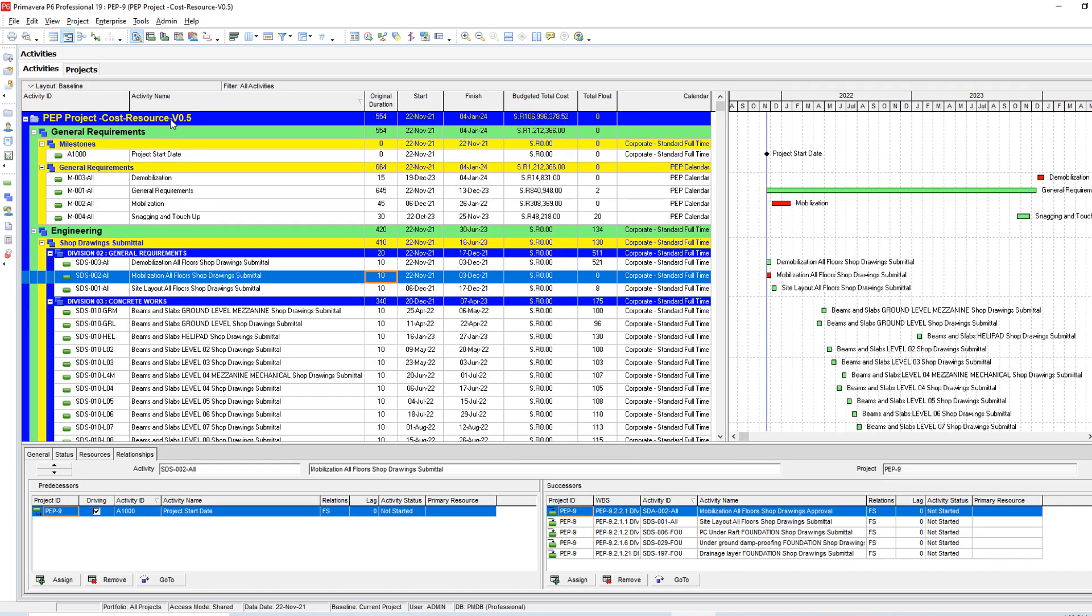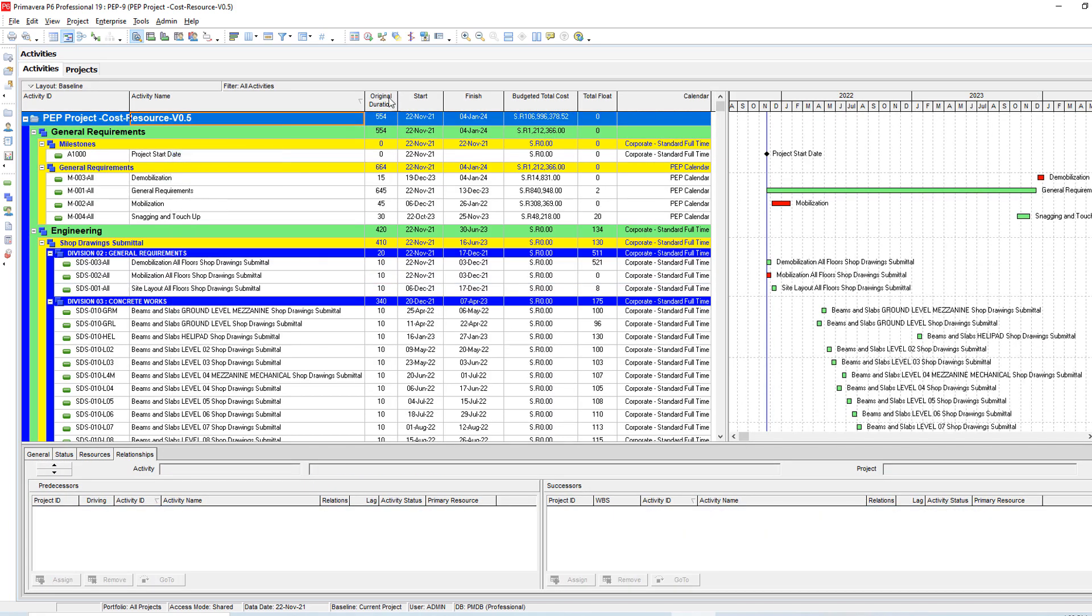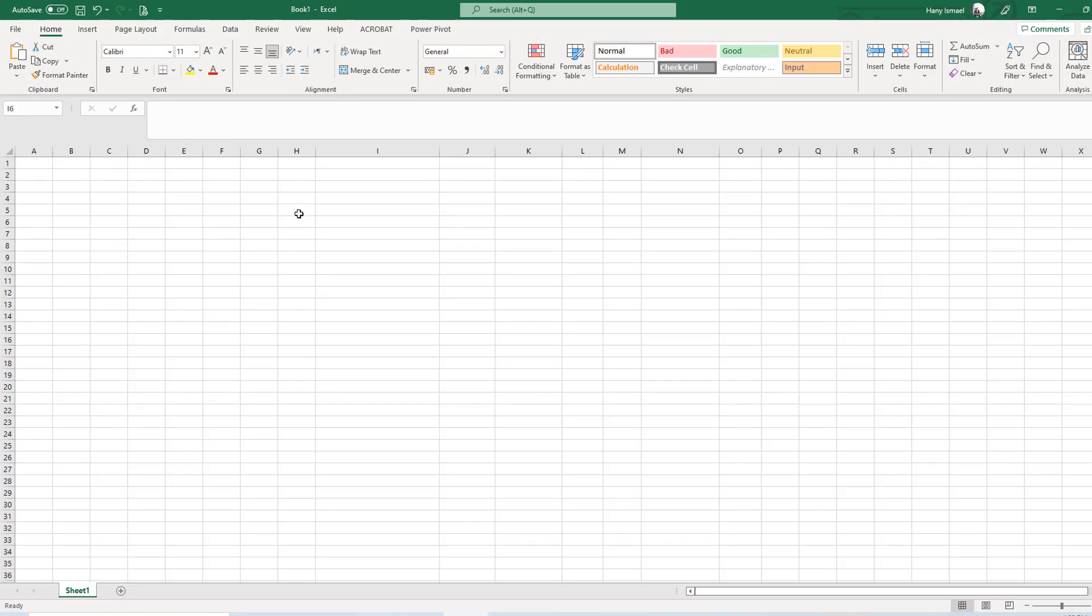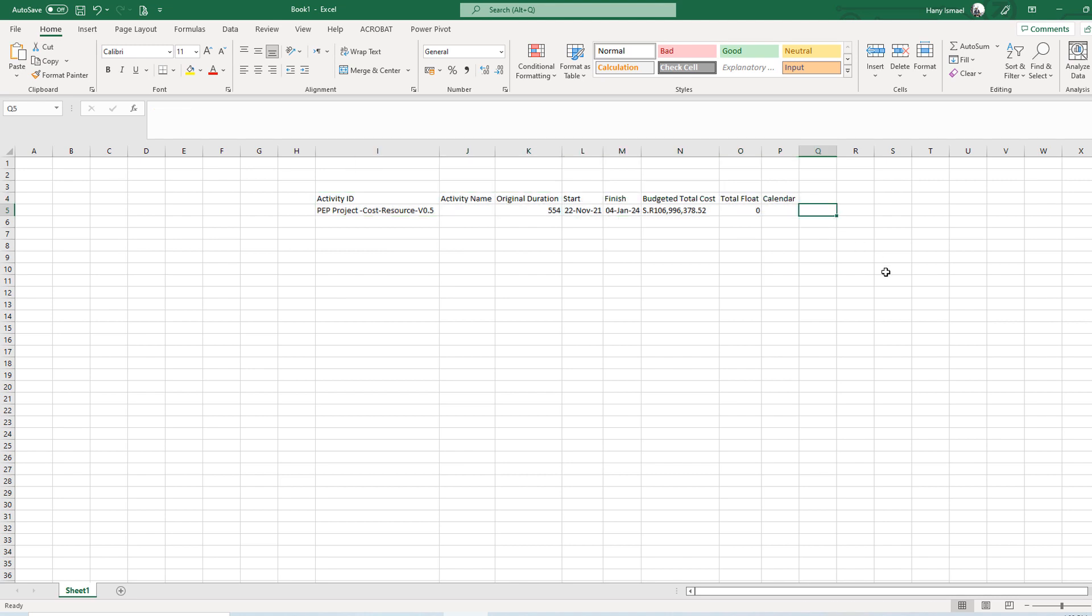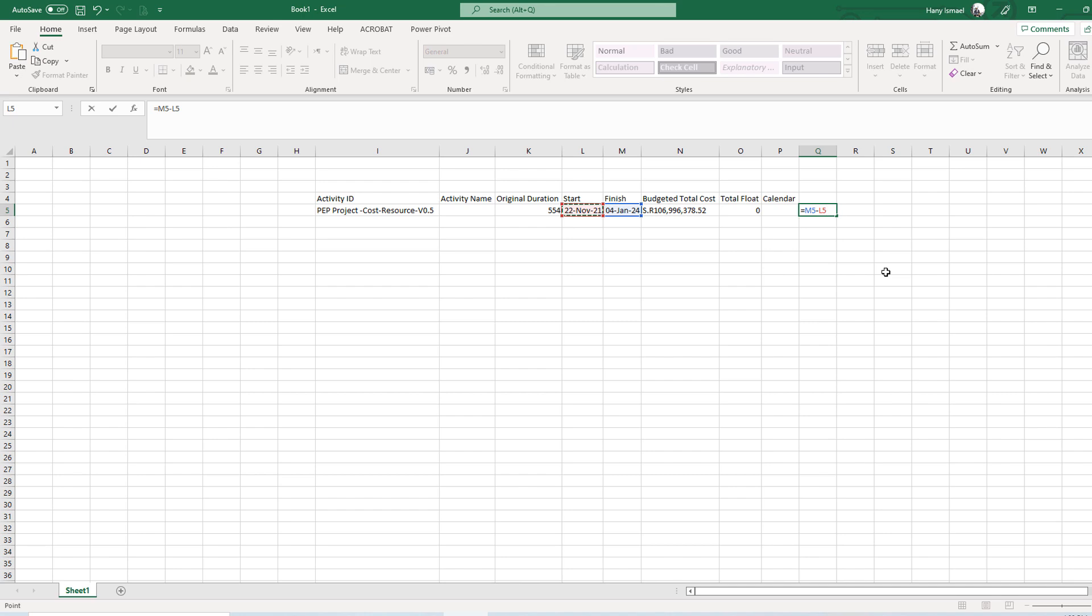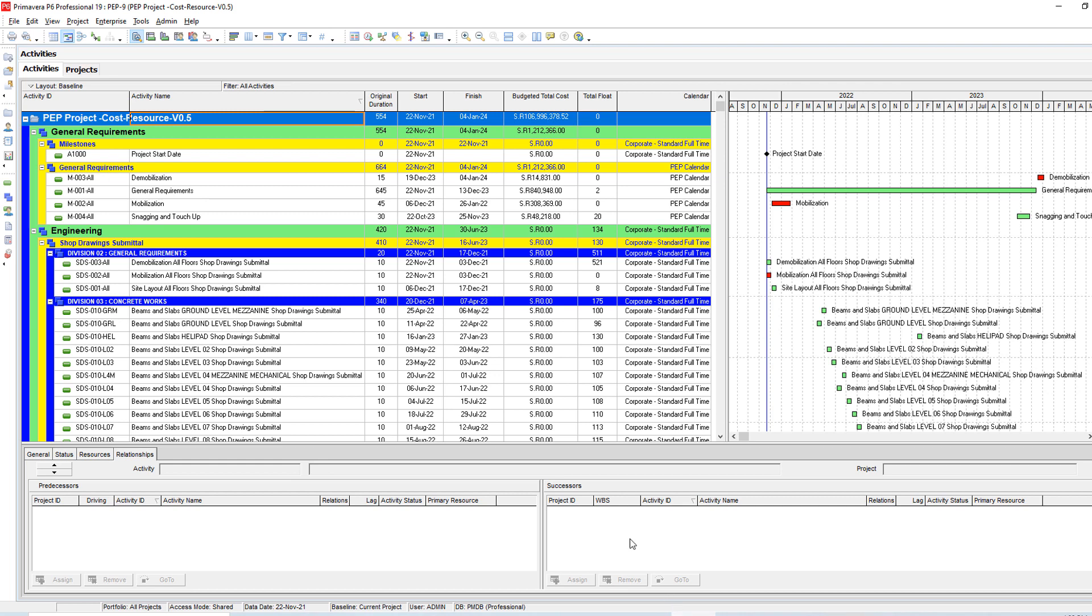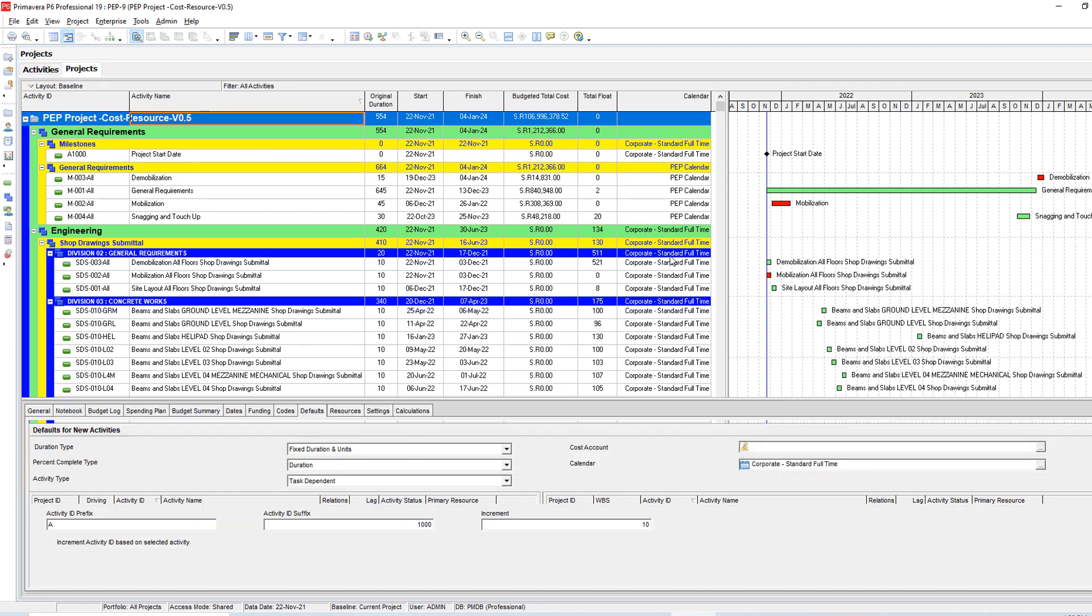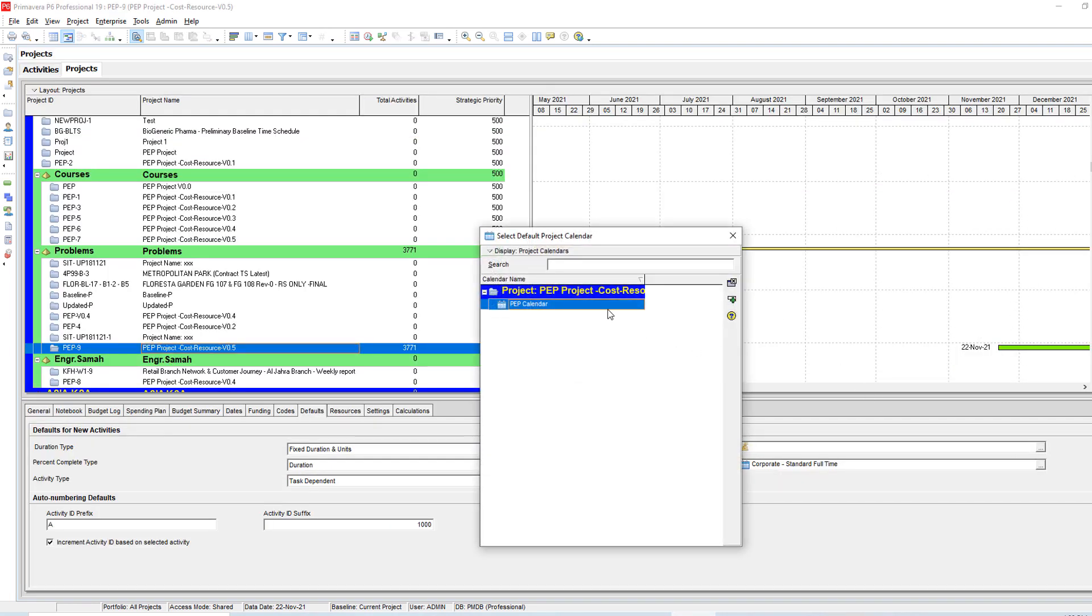So I'm going to paste it here. This is what I have right now. This is the Finish minus the Start plus one. This should be the calendar days, 774 days. But what I see is 554. Let's go and change it and see if it will impact this one.